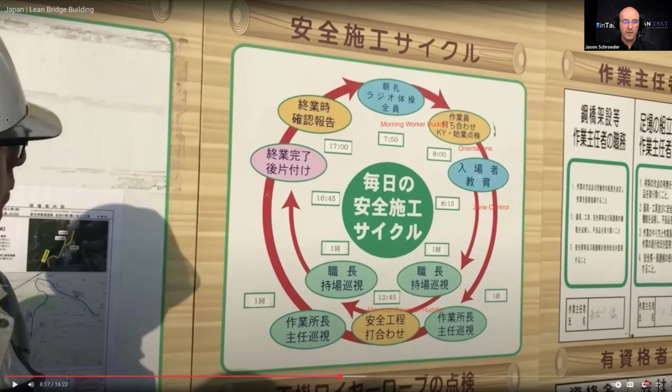This is the most important thing that we can learn from the Toyota production system: Takt, last planner, scheduling systems do not only rely on the actual plan. They rely on being able to stop the line, creating stability in the field, and being able to follow standard meeting structures so that we can work just in time. So I want you all to remember those three concepts. Jidoka, which is being able to stop the line, automation with a human touch; just in time, do things just in time on a daily basis, when it's needed on takt time; and then stability. All of these systems focus on stability.